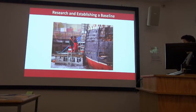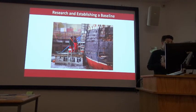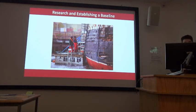So in 2021, we got one of the last traditional wooden boat and ship builders in the UK, Tommy Nielsen and Co., to do a shipwright timber survey. And basically they went around with an auger or a pocket knife and a hammer, and they went around every single accessible timber, interior and exterior, so obviously not including below the waterline, and poked it and prodded it and tapped it and gave it a numerical rating assessing how rotten it was and what its structural integrity was, and filled it in line by line in a spreadsheet.